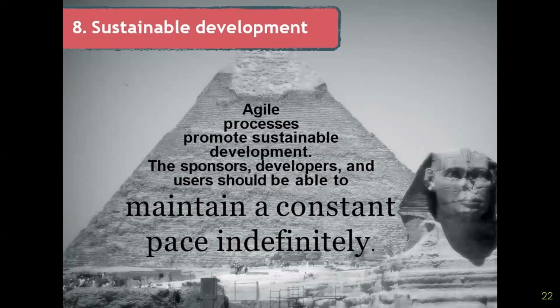If you say we are going to deliver 20 story points, or 10 story points, in this sprint, we'll talk about story points later, that is what we are going to do, even if maybe we have less velocity. That is what you continue to do, right? So you need to commit to something that the team is capable of doing. Sustainable development, in another way, is basically saying in a day, this is what I can finish. That's the worst case scenario, right? I can finish this policy, or this memo, or this communication.